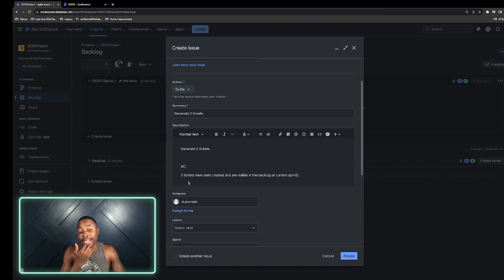I actually made a separate acceptance criteria field outside of the description because I always wanted that reminder, since it is going to be crucial to making this work. If you don't have the acceptance criteria, a lot of times our brains, when we try to make things perfect, keep increasing the scale of difficulty for the ticket or the work, to the point where having a ticket to capture the work becomes pointless because you just keep changing the scope of it. So just have the acceptance criteria. Do not change the acceptance criteria for the ticket. If you need to add additional things, create a new ticket. That way you still get credit for this work and you are seeing the progress of what you're doing.